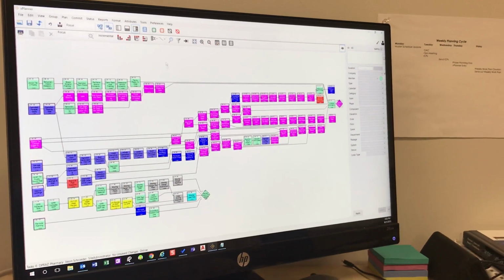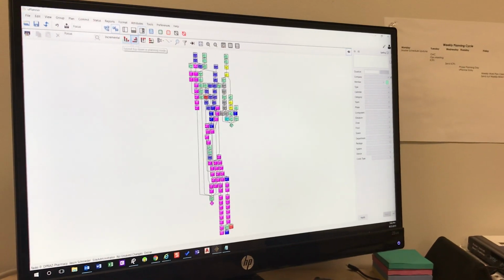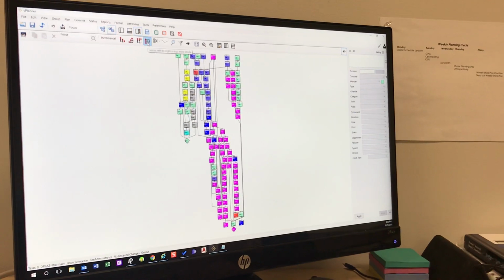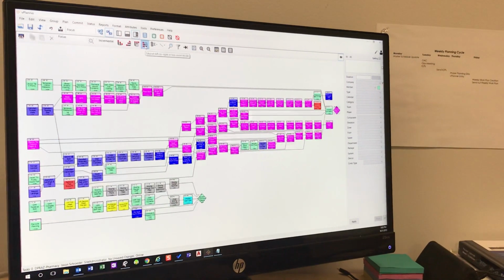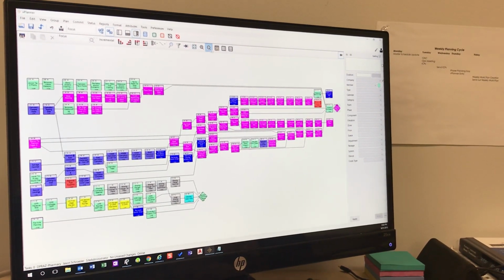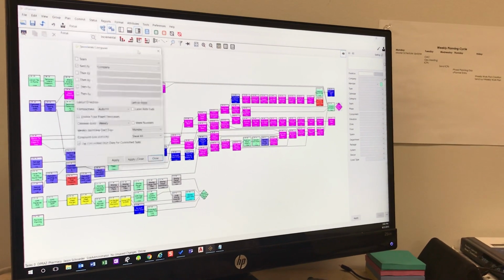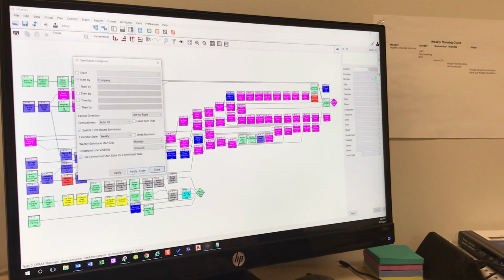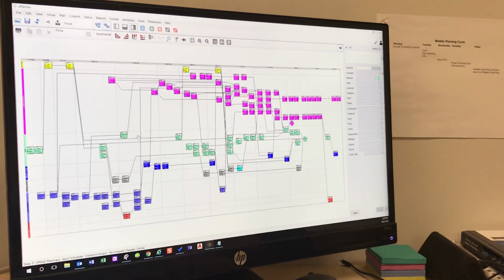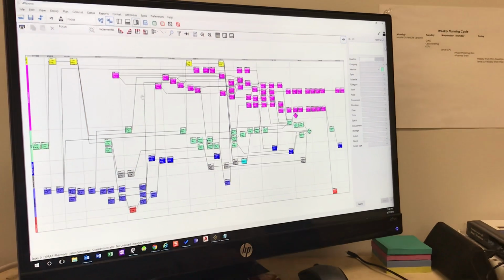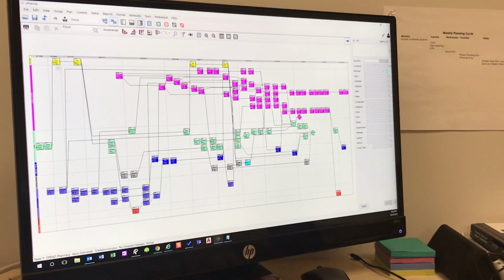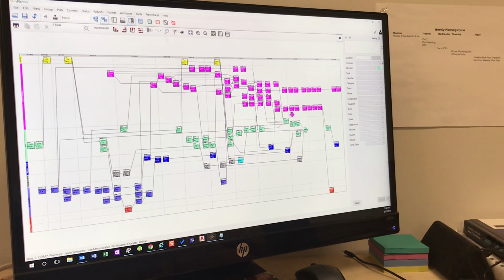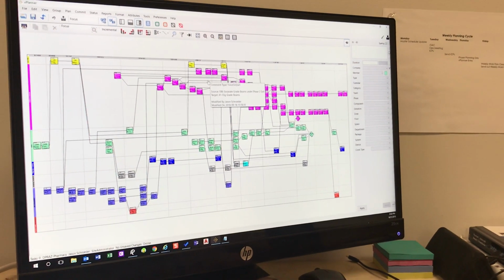What's nice about this is that you can organize it vertically, you can organize it left to right in a certain way, organize it vertically separated by path, organize it horizontally separated by path. You can also come over here, and again I'm just giving you some neat things that you can look at. I can organize swim lanes by company based upon time. And this isn't super easy to look at, but if you print it up on the wall, it helps people to see their activities in a swim lane, in a swim lane, in a swim lane by time, so that they can look at their interdependencies.